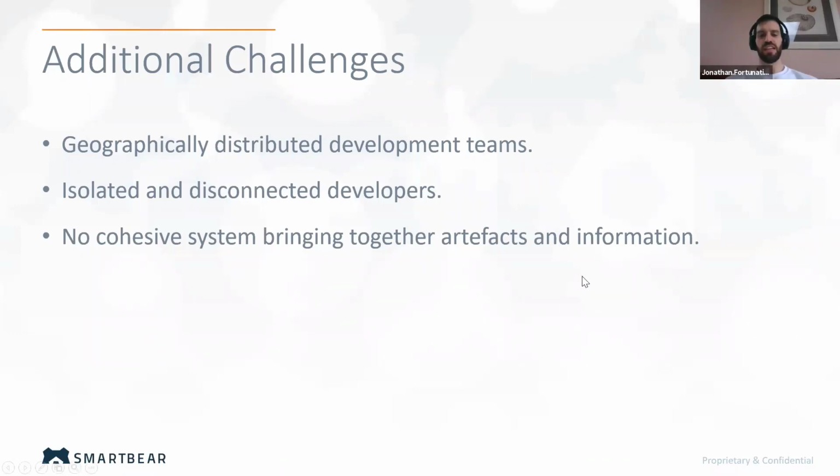One thing I recommend for a peer review process, whether you're doing it through Collaborator or something else, if you're doing Scrum and you have sprints, or some other methodology that has time-boxed events, is at the end of the sprint, at the end of the story, to have a review that looks at everything that needs to be delivered, the definition of done basically, right? Have that be your review.